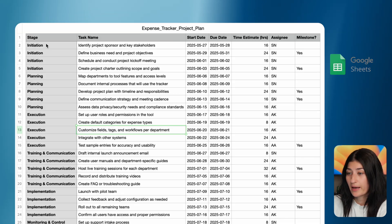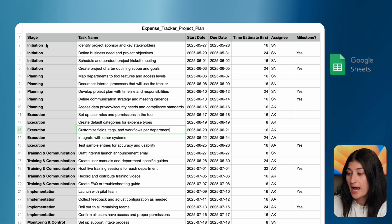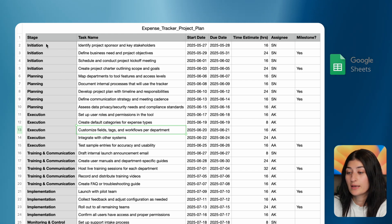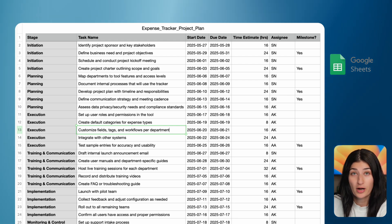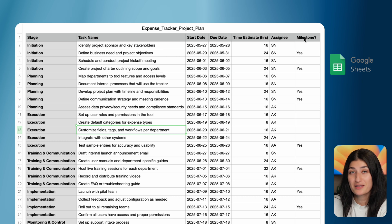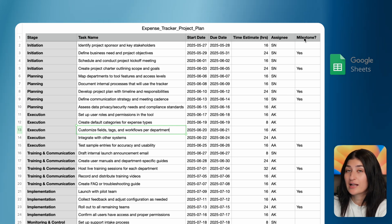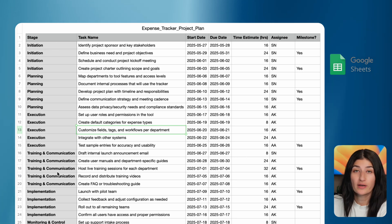For my project plan, I have a Google Sheet with the project tasks that I'm going to be creating. I have stages — I'm going to be using the PMP framework. I have my initiation, planning, execution, training, implementation, monitoring and control, closure, and optimization. These are my stages for my project. Here are all of the tasks, my dates, my time estimates, my assignees, and which ones are milestones. I want to make this more efficient and visible for my team, so that's why I'm mapping it into ClickUp. Let's get these stages created within ClickUp.